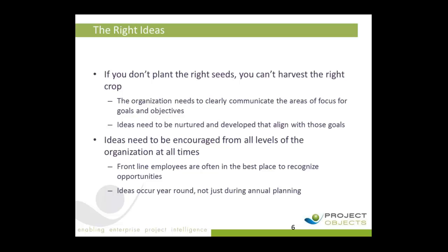All of that is important for the organization to understand, because unless that is understood, we can't harvest the right product ideas. We can't make sure that the right individual initiatives are selected in the first place. And if we start off with the wrong projects, it shouldn't come as a surprise to anybody that we're going to deliver the wrong results. You're not going to get a 20% return on a particular market if you invest in a project that, if it goes perfectly, is only going to deliver a 5% return.